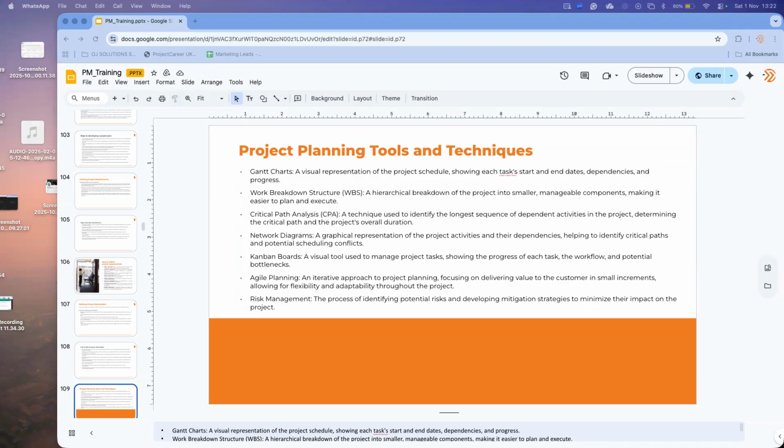Numerically it should be 7, 8, 9, 10, but as you can see, line 8 is the research and benchmarking. That's the phase, line 8. So you always have to skip the next line when you go into the new phase of the project. Same for the system design, giving a few tasks to predecessors. We have the time. Following development, same thing.